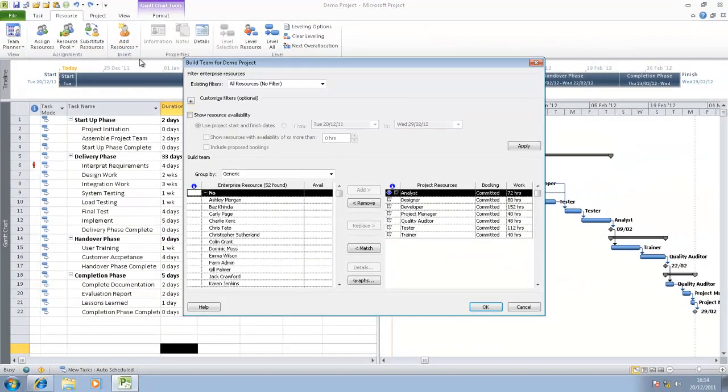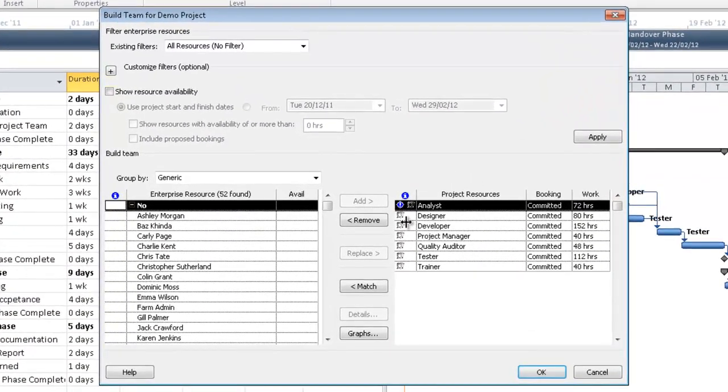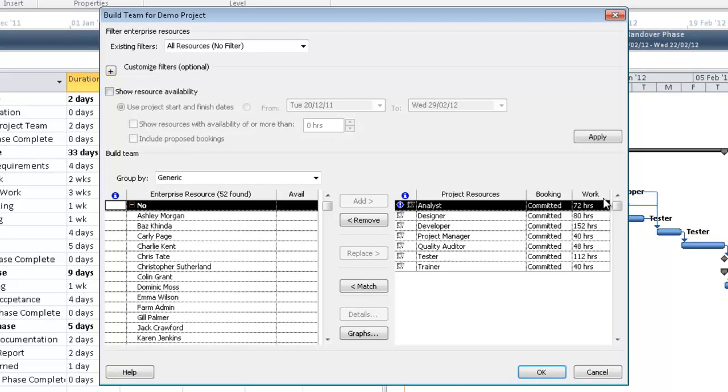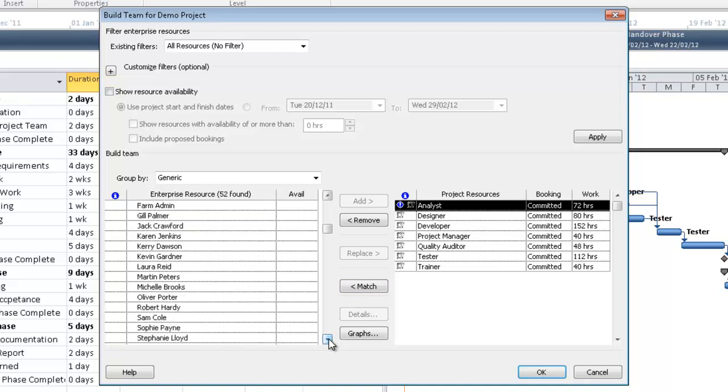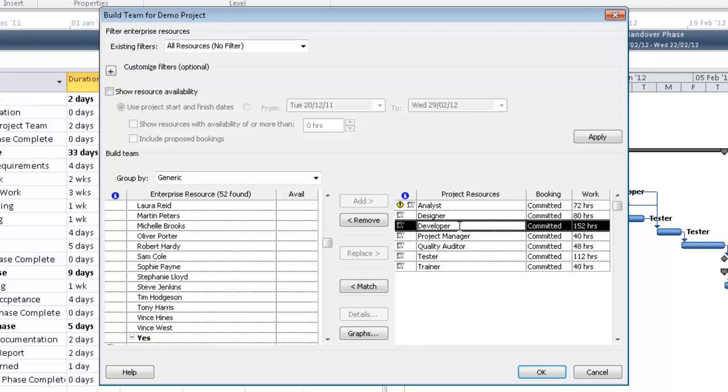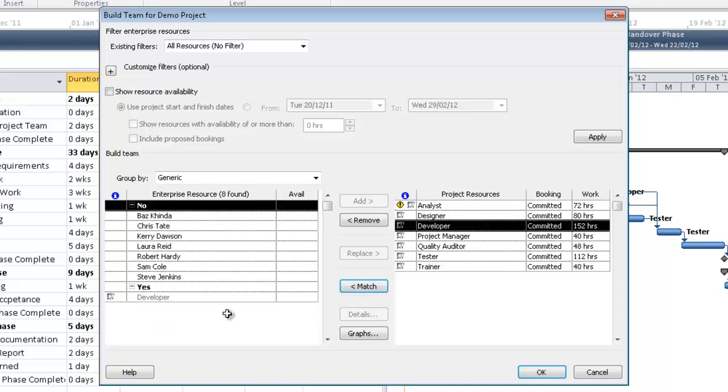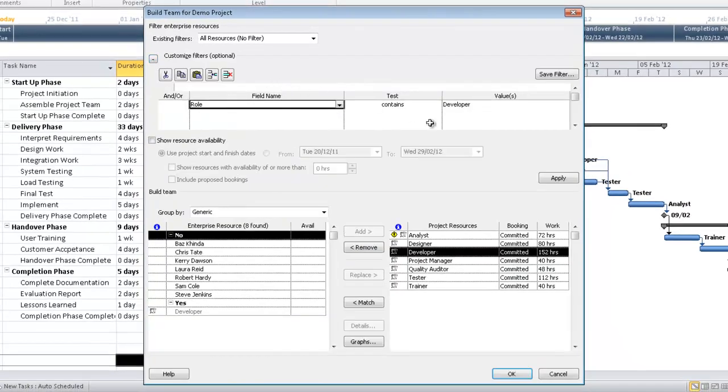What we see now is the build team dialog box. Here on the right hand side, we see a list of all the generic resources that have been assigned to this particular project, and we also see how much work is required from each one of them. What we see here on the left hand side is a list of all the named resources that exist within the enterprise. Let's say I'm looking for a developer. I would simply select developer, hit match, and I'm presented with a list of all the people in the organization that match that particular role.